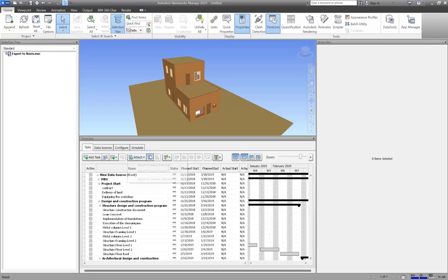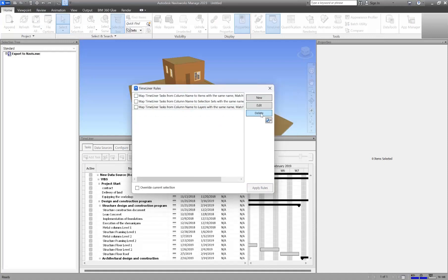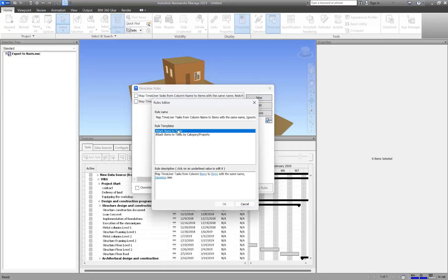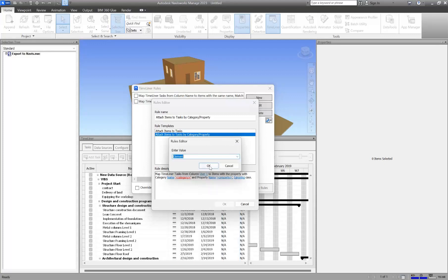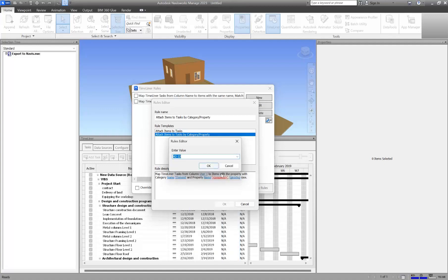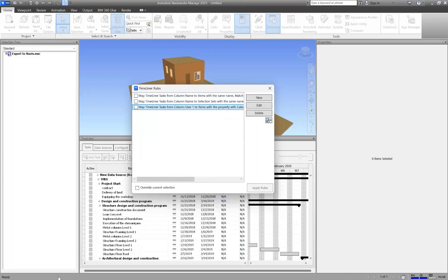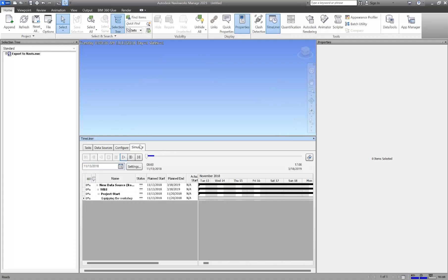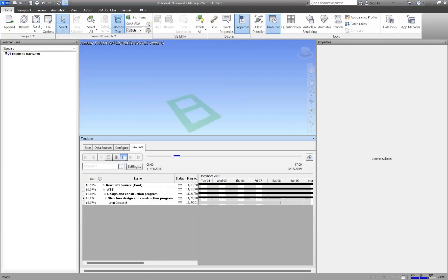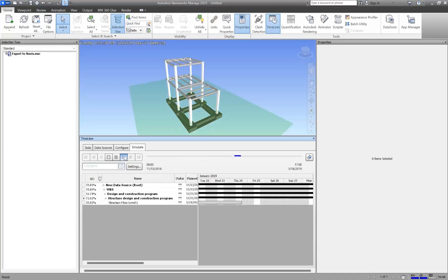Now you need to assign codes to all the objects. Go to the selection rules, right-click and add New, set it to find equivalents. For the column select User 1 — all the codes — then link them to the 4D ID property of the elements. This makes the objects automatically assigned to the TimeLiner tasks. After applying it, as you can see, all the objects are being assigned. Now we can play the 4D simulation.